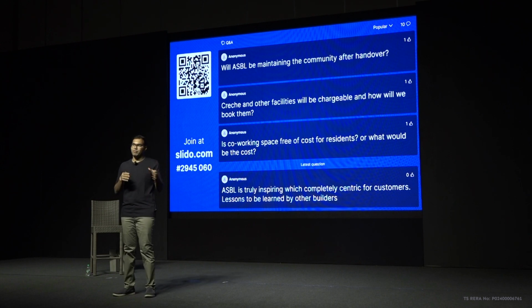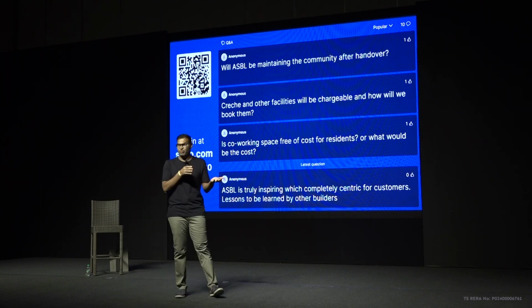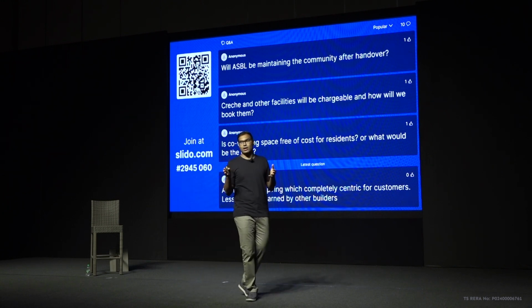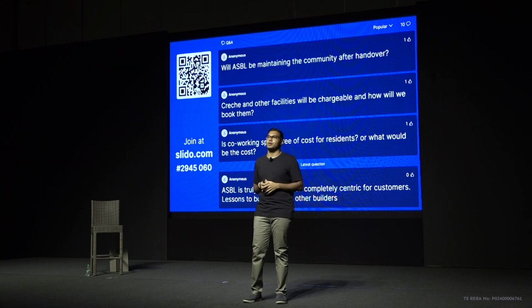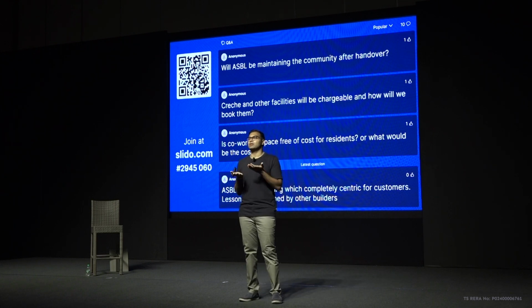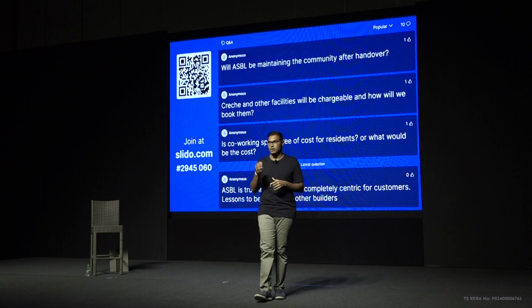And before handover, we have already got the fire approval. Before handover, we will be getting the OC, occupancy certificate, from the fire department. Only after that will we be able to hand over. They'll check whether we complied with what has been approved by the department, and they'll ask the team to share it, or you can get in touch with the CRM team. They'll share the report with you, the fire DBR.